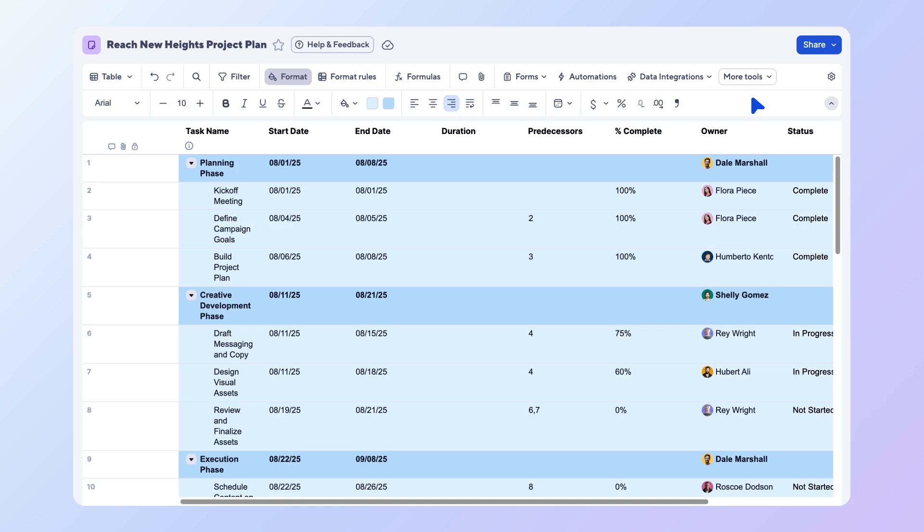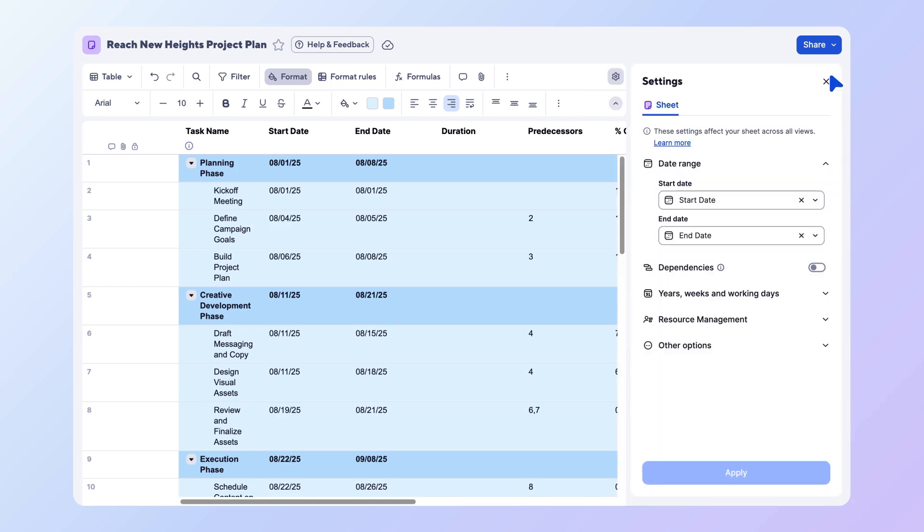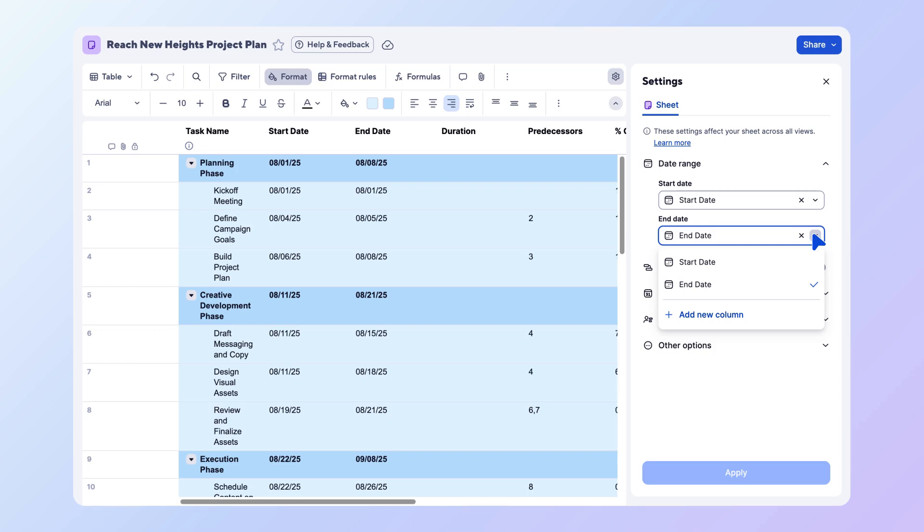Start by selecting the gear icon. Smartsheet will detect any existing start and end date columns in your sheet. If you have not added these yet, you can create new date columns right from the settings panel by selecting add new column.